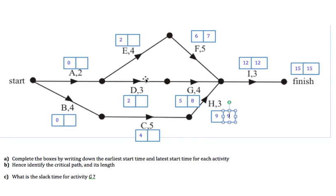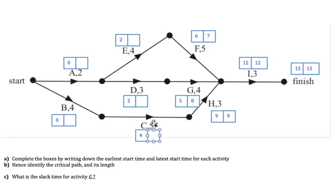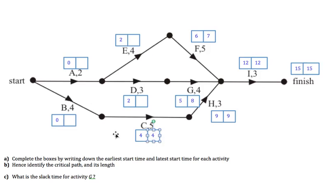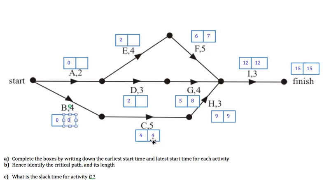Working back along these paths: Activity C must finish in time for H to start at 9. So 9 take away 5 (how long C takes) gives us a latest start time of 4 for Activity C. Going back to B: B needs to finish so that C can start at 4. Therefore, the latest start time for B is 0, because B takes 4 units of time and must start at 0 in order for C to start at 4.